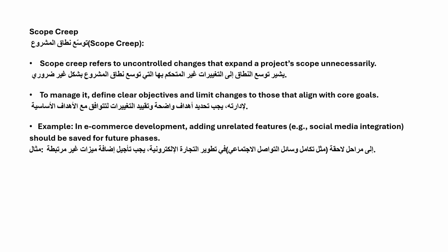If the customer continues to come back after we define the requirements and agree with the customer on them, the customer keeps coming back. We started writing the code and doing the design, but the customer keeps coming with requirements. If we take these requirements, agree to that, and then go ahead and develop those requirements and add them to the system, this becomes what's called scope creep. Scope creep is mainly when, after you define the requirements, you start adding more requirements without any control. So there is no control here. This is what is referred to as scope creep.